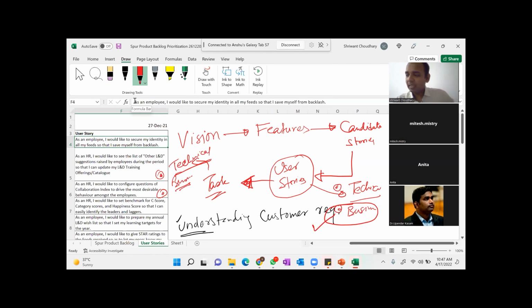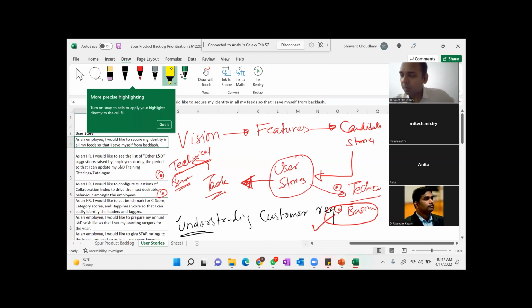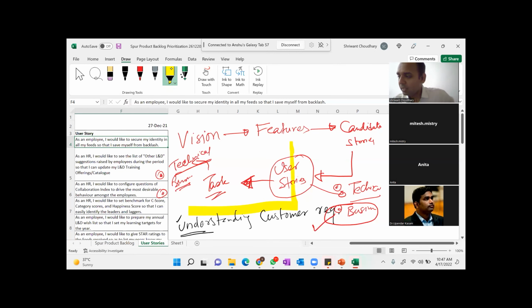And this is called last responsible moment planning. The conversion of user stories into tasks is what we do in iteration planning or sprint planning. We convert the user stories into tasks, and then we delegate the tasks to different team members, and we track whether they are doing it as per plan or not.